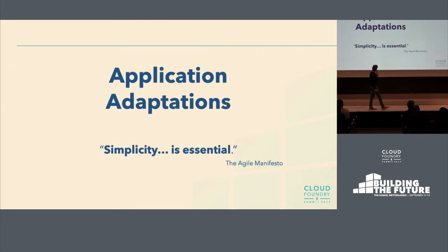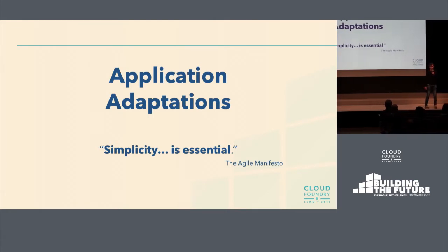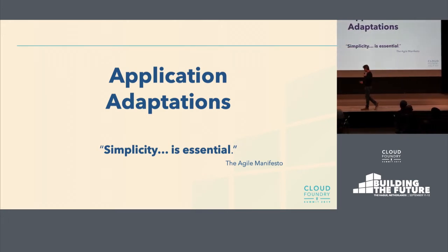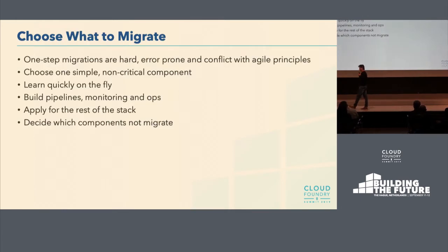So let's talk about the actual application changes. You have an application that runs on some other platform and you want to migrate it into Cloud Foundry. Before talking about that, let's quote the Agile Manifesto here, which says that simplicity is essential. Applying that to the migration process means that you really want to break down your set of applications instead of deploying everything together and migrating everything together into Cloud Foundry.